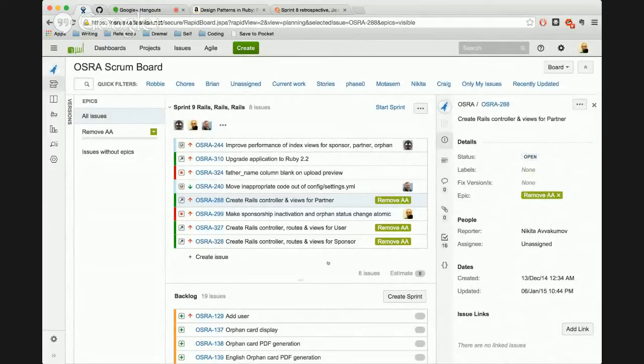Okay, so I guess I don't think that we will get to the sponsor model very quickly, probably not within the next week. But before we get to sponsor, we probably need to try this facade approach on the partner, right? And see whether it works and whether we need to apply this to sponsor as well. Yeah, because user, like I said, is so simple that I don't think facades will be warranted at all. So that leaves partner as our sort of test bed for that.